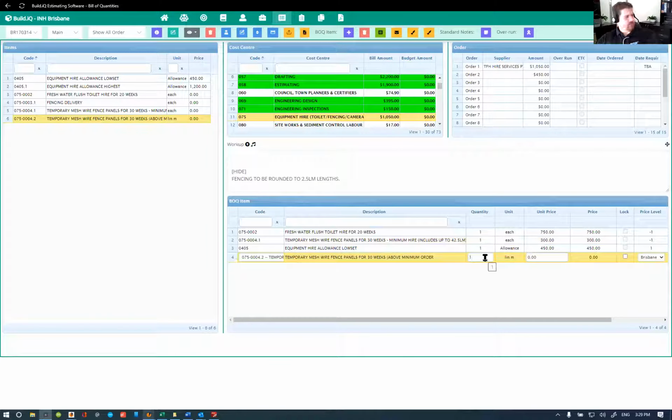So they modified saltwater 190s. And the truss quotation was 13859.34 divided by 175.87, which is closer to this original fee. I'm going to go in at about 12 grand as my allowance, only because there's not enough information to the contrary.